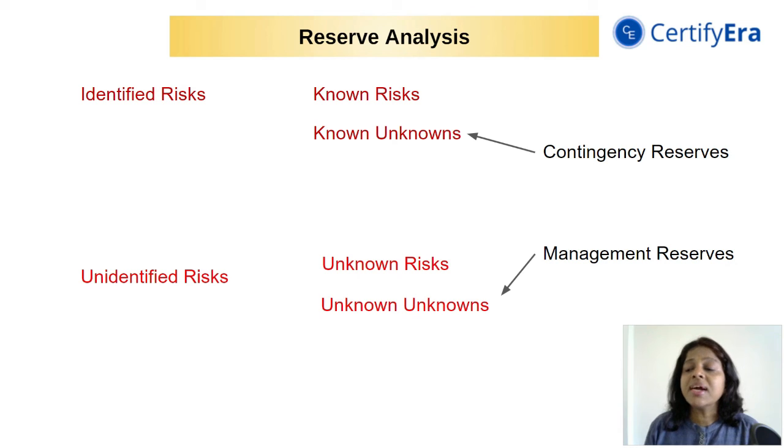Revising the contingency reserves and management reserves by considering the risk severity at regular intervals is known as reserve analysis. So reserve analysis is analyzing the contingency reserves and management reserves and considering revising those reserves so as to make up for any losses in the project life cycle.